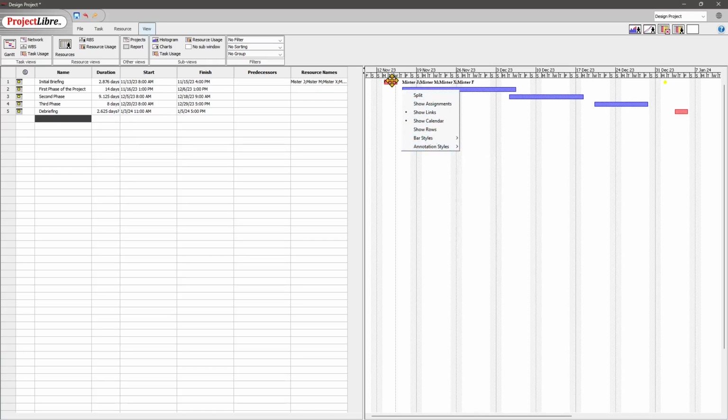Okay, now let's organize this a little bit better before. Okay, so here we have the deadline. So all I want to do now is make this subsequential, which means that they're gonna be like one after the other, and you need to finish one in order to proceed with the other. So if I select this one here, it's gonna be like the last part. Now this one here, it's only possible if the project is finished. So let's say that this is the project right here.